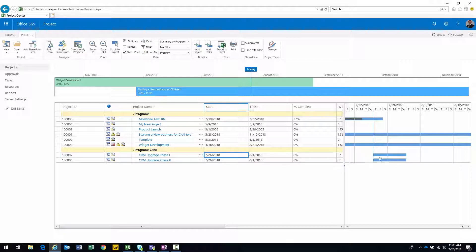Notice in the Gantt chart they both start and end at the same dates. What we want to do is create a relationship between these two projects such that the activities taking place within the phase one project will impact phase two. Ideally, phase two is not going to start until phase one completes. And that's what we want to represent here — we're going to create a relationship between the two projects.